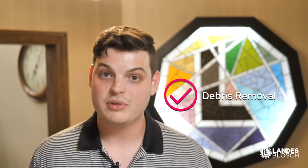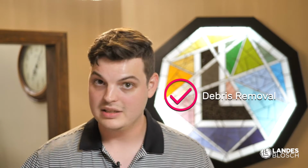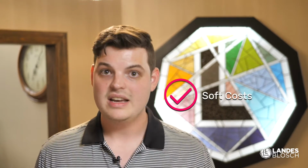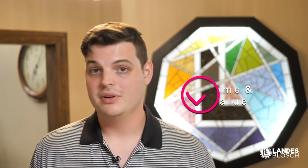It covers the debris removal if you were to have a claim and contractors had to come in and clean up the project site. It covers things such as soft costs, which are architectural fees, increased real estate fees, or maybe insurance premiums associated with the extension of your project because it's not done, or the redoing of the plans. And finally, business income and rental value.